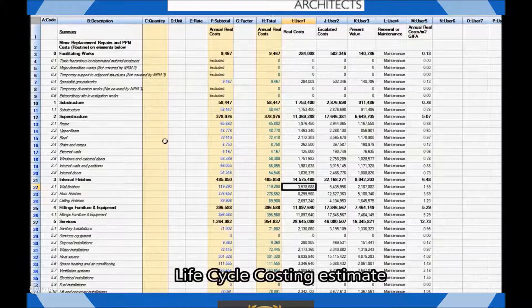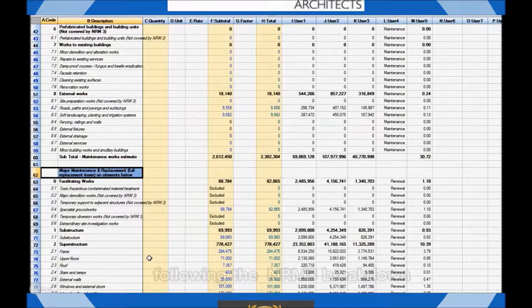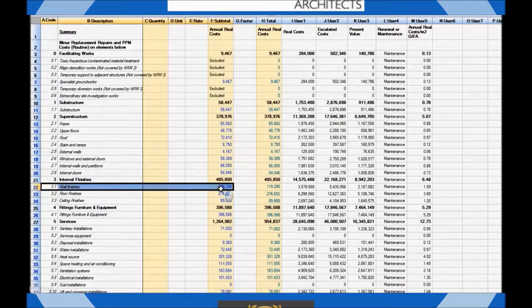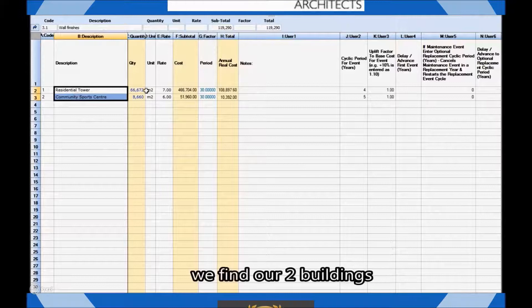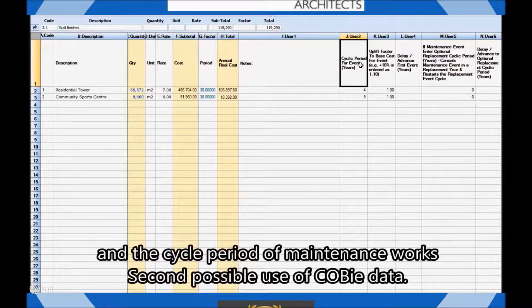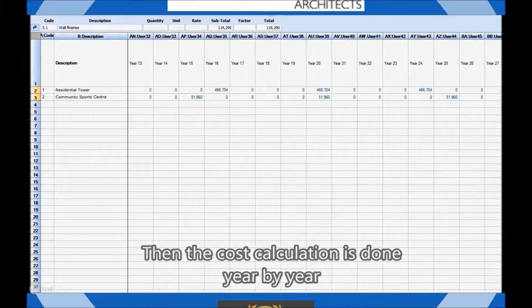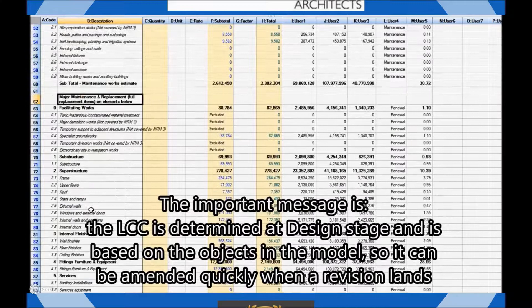Switching over to the cost estimate, you can see the lifecycle cost breakdown following the NRM3 standards with maintenance works and renewal works. Now if we drill down into the details of the estimate for the wall finishes, for example, we've got the cost calculated per building between the Sports Arena and the residential tower. As you can see, we have data cells indicating the maintenance cost and the life expectancy, or maintenance cycle in this case. Both pieces of information can be automated from the COBE data schedule. Then we have the rest of the spreadsheet calculating the year-by-year cost for this particular element. This is what we can do from design stage with good data and a good 3D model for the lifecycle costing analysis.